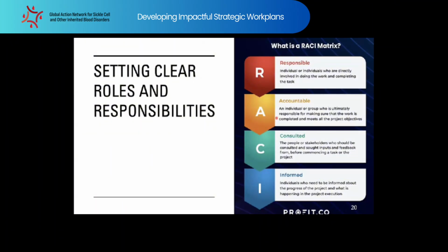So again, they're not doing the work themselves, but they're consulted and asked, how should this be done? And those who are informed, individuals need to know about the progress of the project and what is happening. So again, maybe your board shouldn't be in the R or the A button. Really, they should be maybe more in the C button, C column, if you will.